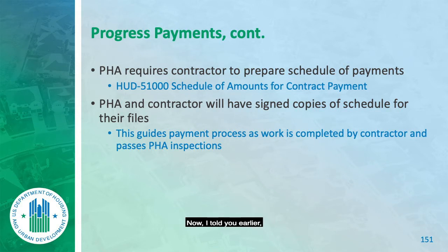Now, I told you earlier that if it's a materials receiving slip, I'll do handwritten adjustments to the slip in the invoice. Remember I told you that? If they said they shipped 20 and I only got 18, I will change the shipping slip to say 18. And if there's going to be a delay in delivering the other 2, I will change the actual invoice. Never do that on construction.